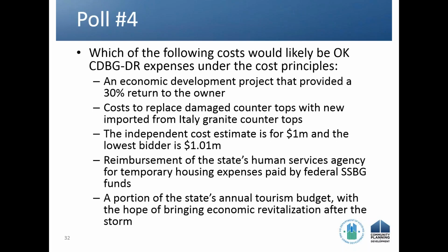So it's not that granite is always bad, but it does raise eyebrows, and it begins to look like a luxury item. So if you're going to do things like granite countertops, hardwood floors, special fixtures, you have to be able to justify that that's a reasonable, necessary, typical construction expense in a medium, modest quality housing community. And you'd want to look at the cost of that as compared to the cost of putting tile or whatever other kind of countertop.